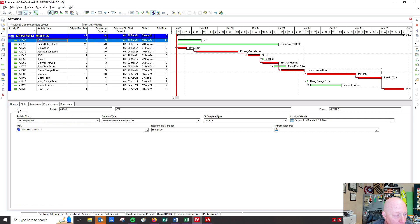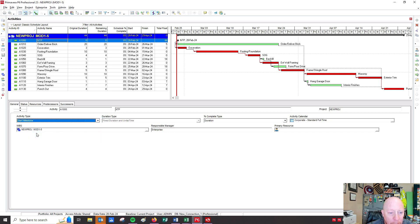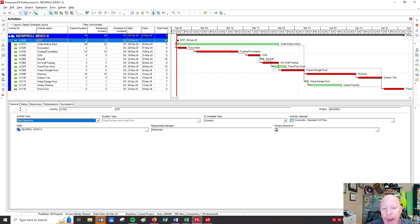I'm going to go back to the general tab, make sure I have notice to proceed highlighted, and click start milestone. When I do start milestone, it changes to a little black diamond and puts a zero at the original duration, so I don't have to change any of that. So that's done and those relationships are built.